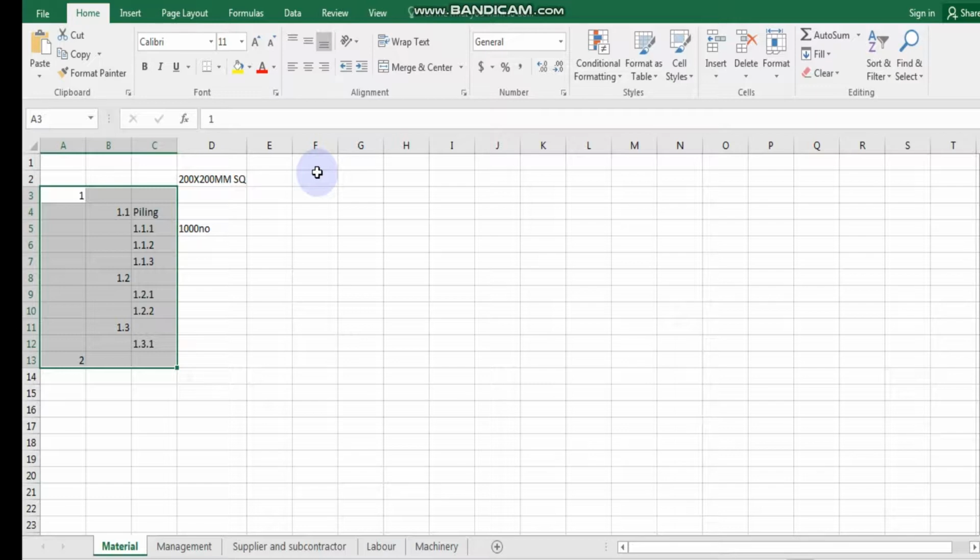Everyone understands so far? Okay, so again, to recap, you put on all your resource work breakdown analysis that comes up with a work breakdown structure. It's going to be a full list with a few layers inside, and with this full list you can remark on every single one of the activities, on what you need and what the specialties are and what things are necessary, in a remark column before you go into the different resources. Now you can split your resources sheet into various sheets in one project file, and from that one project file you paste all your work breakdown structure into every sheet in the resources file,